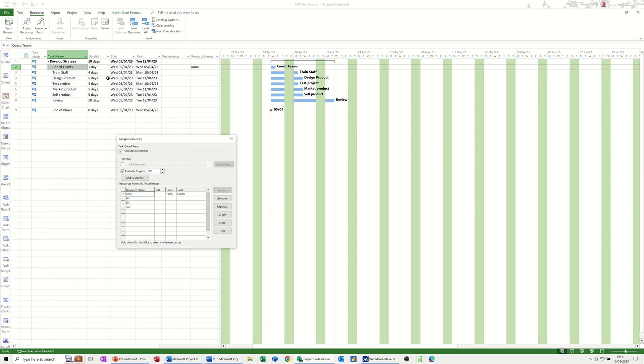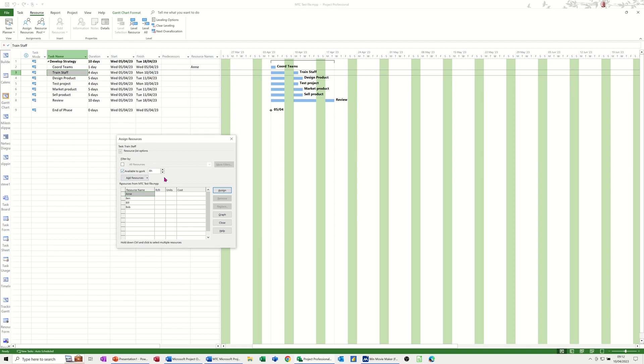Now this task here is a four-day task and they're all available for eight hours. But if I put this up to 32 hours, for example, see what happens. They're all available for 32 hours, and Ann is not available because these are all going on at the same time.